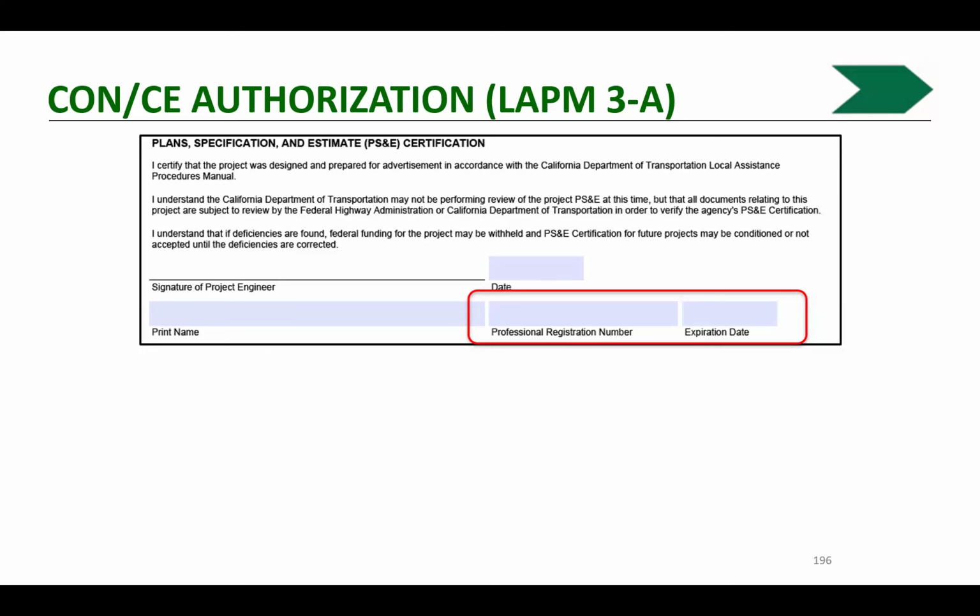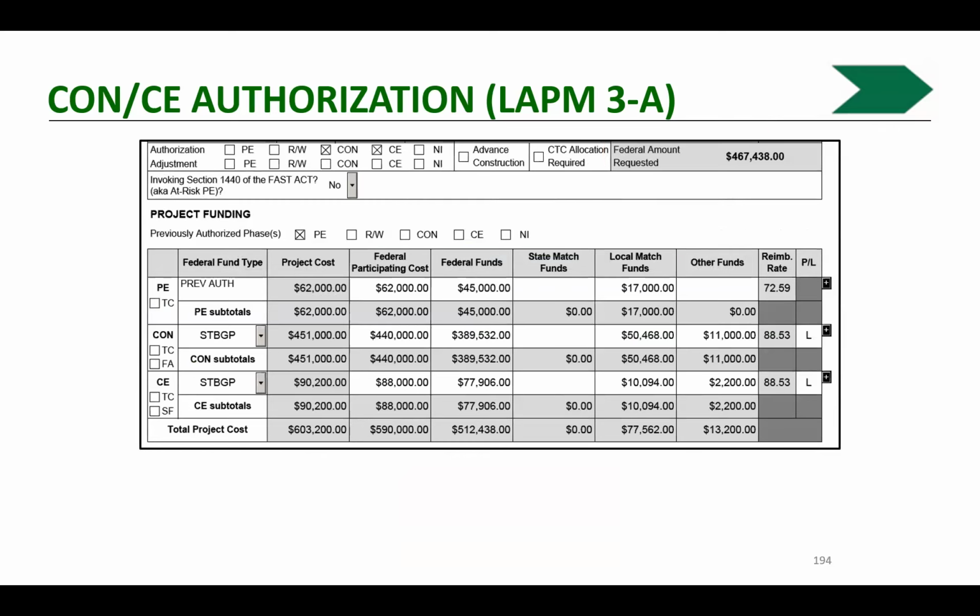And no, it did not indicate that on that form. It should be signed by, and maybe PE is the wrong phrase, it needs to be signed by the project engineer, a person who knows the project, who can verify that the answers on that form are true. So usually that's the person in responsible charge of that project.